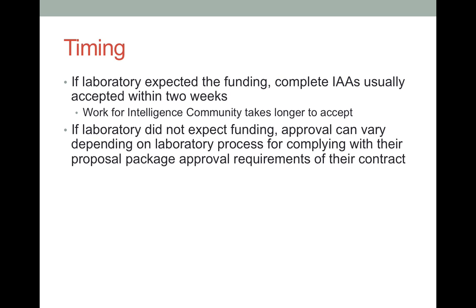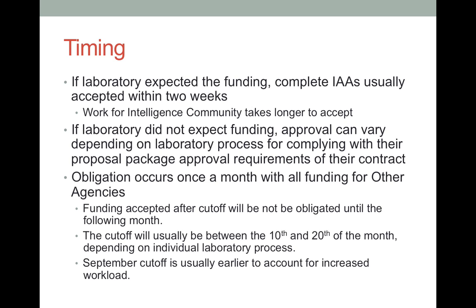The laboratory has requirements to comply with on their contract as well. If they were not able to meet those requirements before the funding is received, acceptance may be delayed. Be sure to keep your laboratory PI informed on funding progress so that they are ready to accept once the funding is sent. The contractors can begin work as soon as the DOE CO authorizes the work when the funding is accepted, but the actual obligation does not occur until the DOE contract is modified to add the funding.